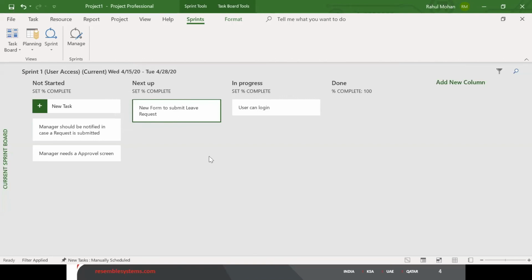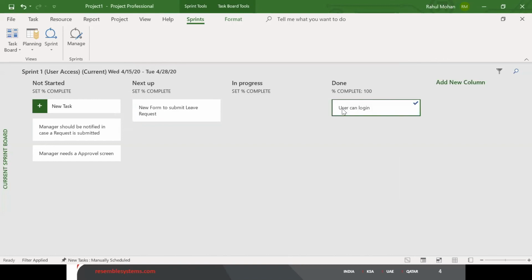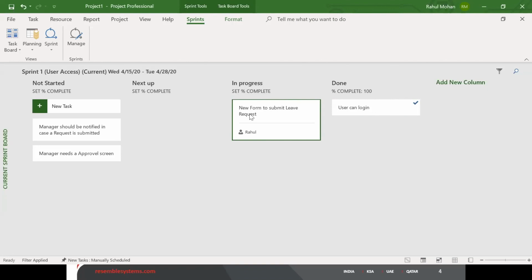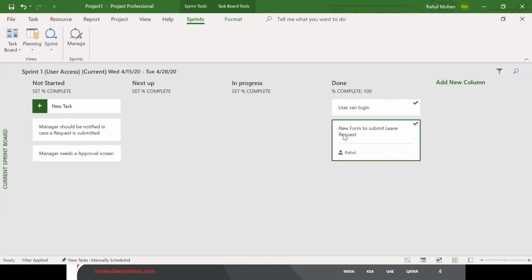And once my task is done, I may move it to the completed part. So from a Scrum Master point of view, the Scrum Master has a dashboard where they can look into all the tasks, what is progressing now, and that can be one valid reason during the daily meeting for what should be discussed, what is planned, or what they're going to do for the day. So this is like a dashboard for the Scrum Master in terms of execution. And maybe I put it under task, and when it is done, it's completed.